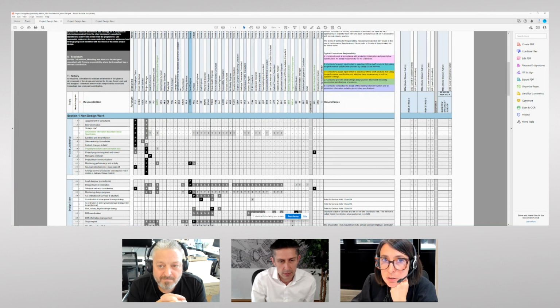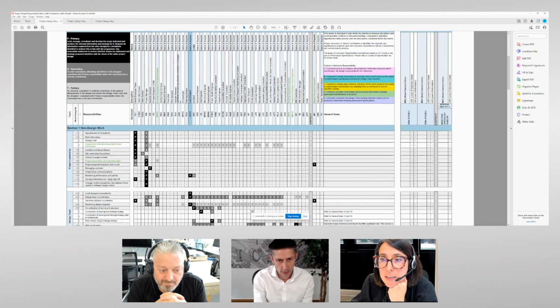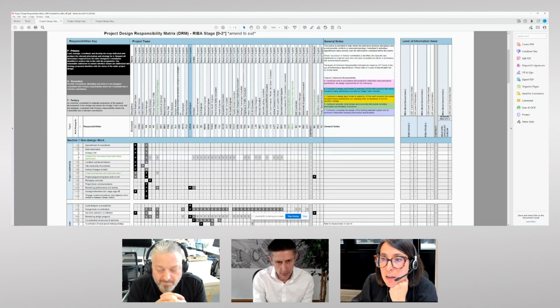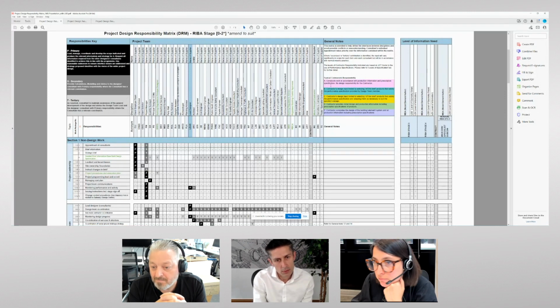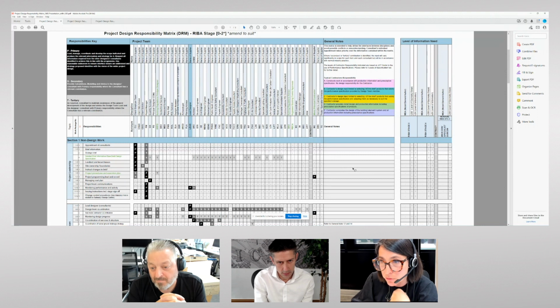So although it's not shown on the DRM, the crib sheet tells the architect whether it's an A, B, C, D or E level of spec, and then an A would be a prescriptive specification for us. Everything else would be a descriptive specification. And the P and the D, appreciate there's some Ps on the screen as well, but ignore those. They're shown in the crib sheet so people can find the relevant system to use. And then it's also shown within NBS Chorus.